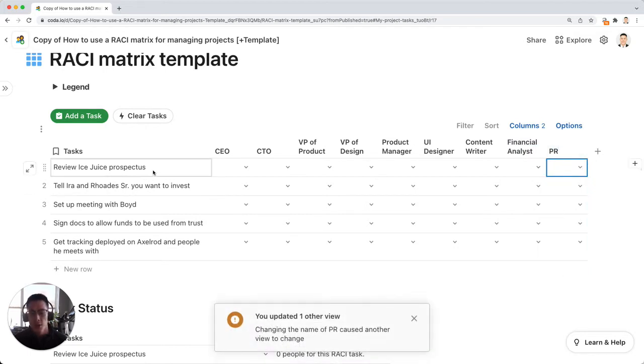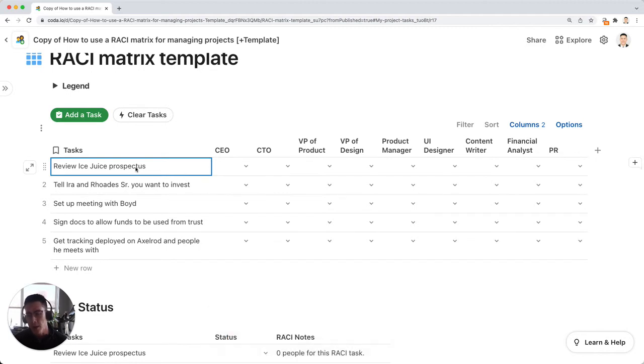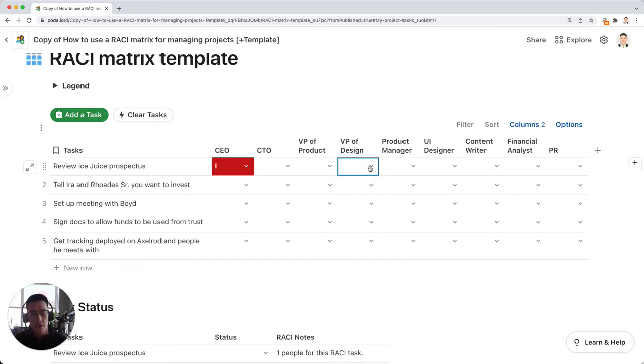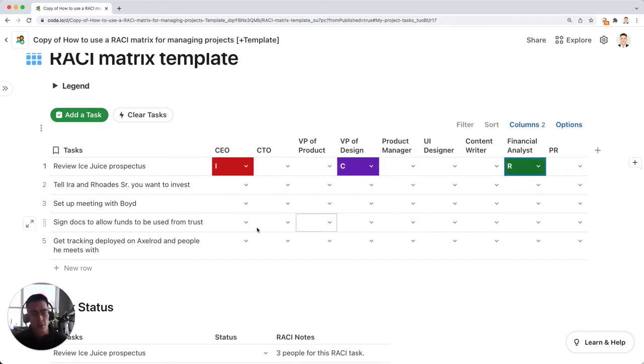So for the individual task of this review ICG's prospectus, you might want to say the CEO is informed, the VP of design is consulted, but the financial analyst is responsible.